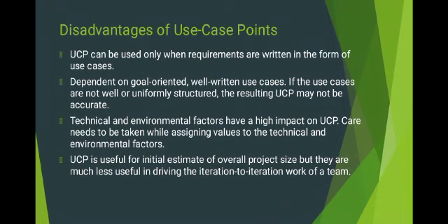Second, technical and environment factors have a high impact on UCP. Care needs to be taken while assigning values to the technical and environment factors. UCP is useful for an initial estimate of overall project size, but it is much less useful in driving the iteration-to-iteration work of a team.